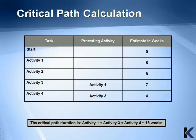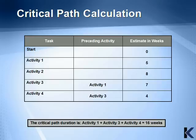Here's an example of how the critical path duration is calculated. Across the top of this table, you'll see the task, preceding activity, and the estimate to complete in weeks. Down the left side, you have the activities listed. Note that activity 3 is dependent upon activity 1 to be completed before it can begin, and activity 4 cannot begin until activity 3 is completed. Therefore, the critical path duration is calculated by adding activities 1, 3, and 4, giving a total of 16 weeks.